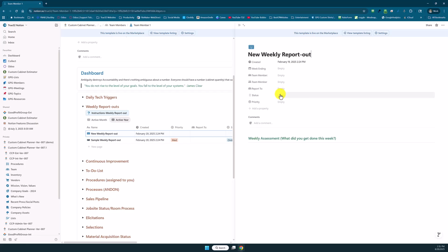And then the status, and I'll just go ahead and show you the options. So as far as what you're working on, is it on time, at risk, or off track? The idea behind this is I don't need any help. I'm good. Everything's okay. Or, it's not perfect, but I may not need any help. It's at risk. So it's up to the boss, whoever I answer to, whether they want to offer some help or let me run a little bit longer to see if it ultimately gets back on time or goes off track. And then off track is I need help. Somebody needs to help me or we're going to get behind because what I'm working on is behind.